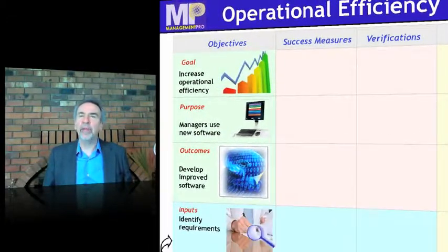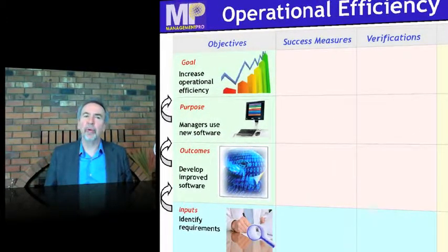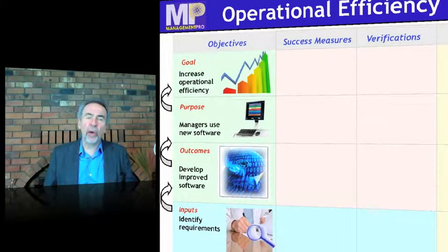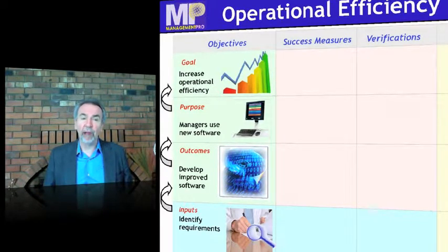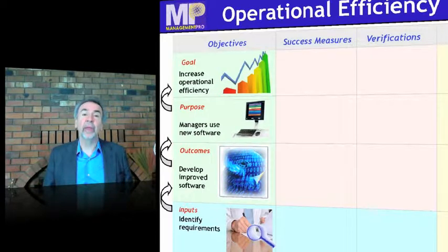So the logic is: if inputs, then outcomes. If outcomes, then purpose. If purpose, then goal. Now the other questions built into the logical framework describe what success looks like at each of these levels in advance, along with how we'll verify it. It also identifies some of the risks in getting to those objectives.